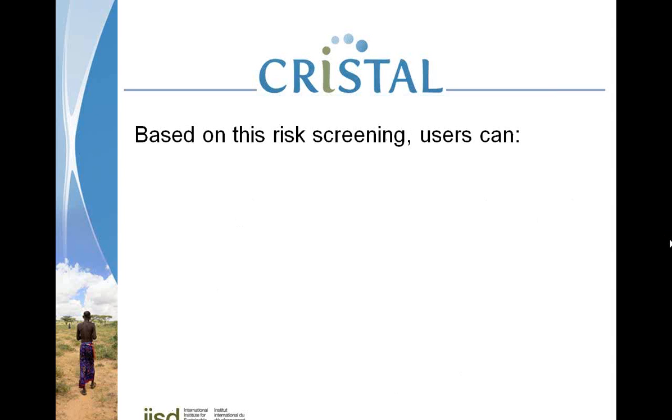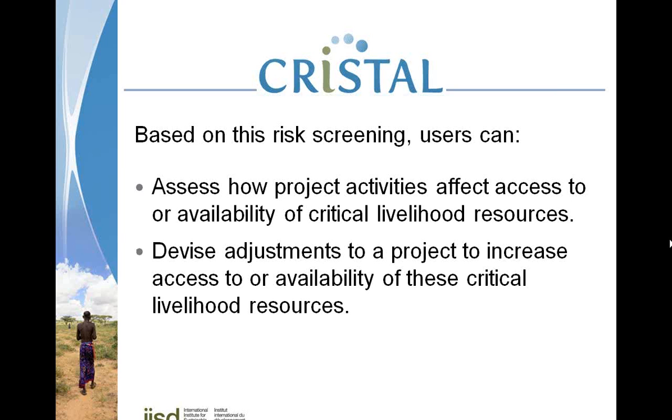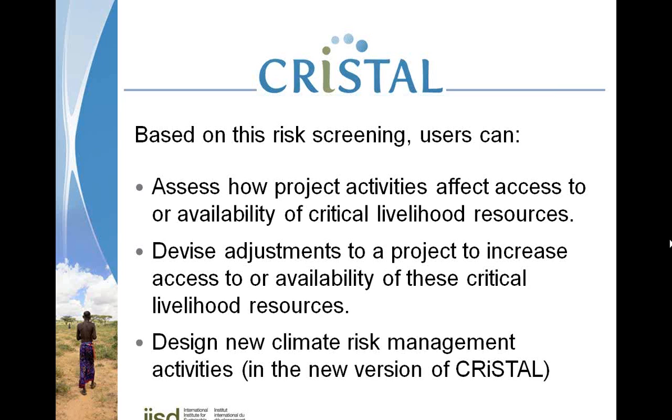Based on this risk screening, users can then assess how project activities affect the access to or the availability of critical livelihood resources. And based on that, devise adjustments to any given project in order to increase access or the availability of these critical livelihood resources. A new version of CRiSTAL is available from late 2012 onwards, and it will allow users to design new climate risk management activities as well.